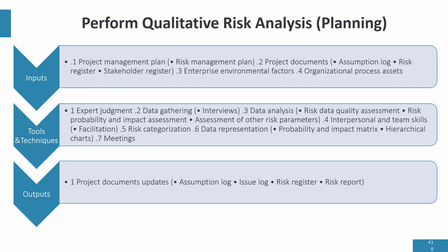In order to perform quantitative risk analysis, I'll just focus on the tools and techniques. Expert judgment: an expert can help us in analyzing risk. Then we can use data gathering to interview stakeholders about probability and impact. We can also use risk data quality assessment.